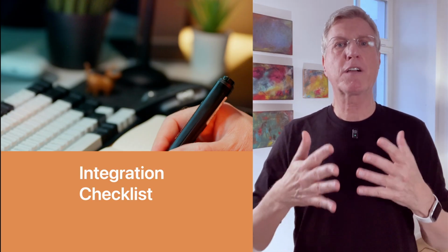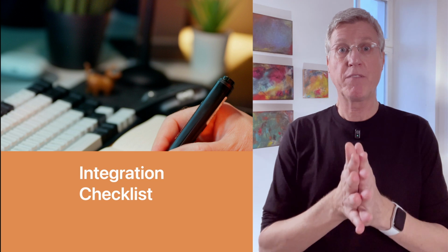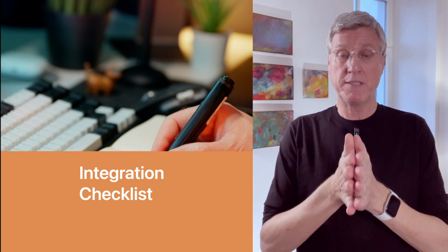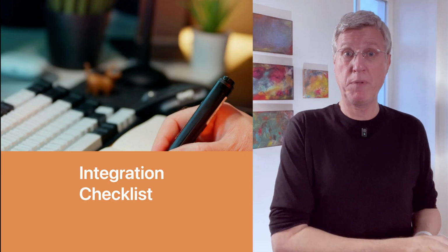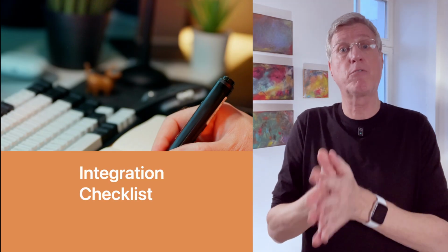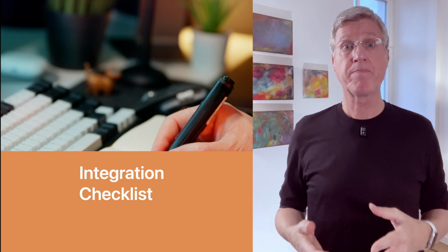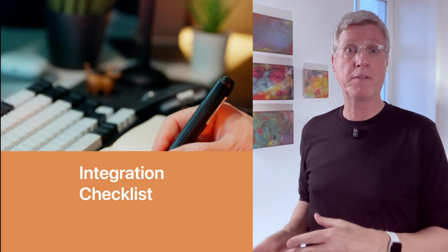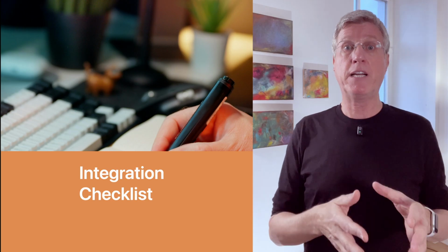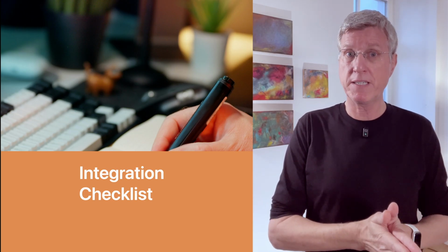Now let's go over a concrete checklist for integrating your components. First, do your components actually connect? Your scope should drive your WBS. Your risks should relate to your timeline and your resources. Your stakeholder needs should be reflected throughout all the components. If these connections aren't clear, then something needs fixing.